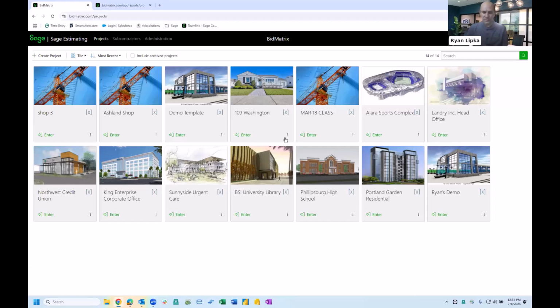So really, it's going to be where we can track our sub and vendor bids, do some bid analysis, some bid leveling. We can handle and track those things like clarifications, otherwise maybe better known as inclusions or exclusions, as well as, like was mentioned in the introduction, that we can do those DB statistical tracking. So if you're performing maybe some of those government funded projects where we have some of those statistic requirements, as we're performing our bid analysis and doing our subcontractor selections, we can track and make sure that we're meeting those requirements as we go along.